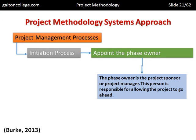Going through the initiation process, the first step is to appoint a phase owner — somebody must take responsibility and be seen as the champion of this particular project. The phase owner is the project sponsor or project manager, responsible for allowing the project to go ahead. The initiation process must start with the appointment of someone who is going to take responsibility for the project and see it through.